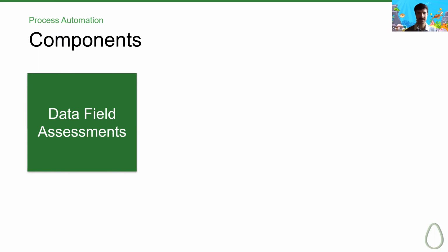So this example might sound familiar to many of you. I once worked in an organization that needed to provide monthly updates on their projects. 3 different people would manually compile 3 different reports with data that almost perfectly overlapped. We were able to totally eliminate this manual effort by implementing a monthly update process that used data field assignments to push and pull data to the project details.